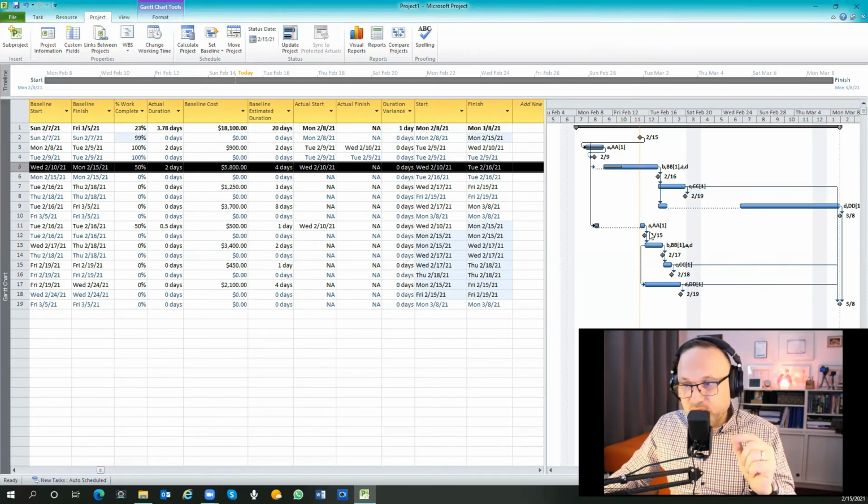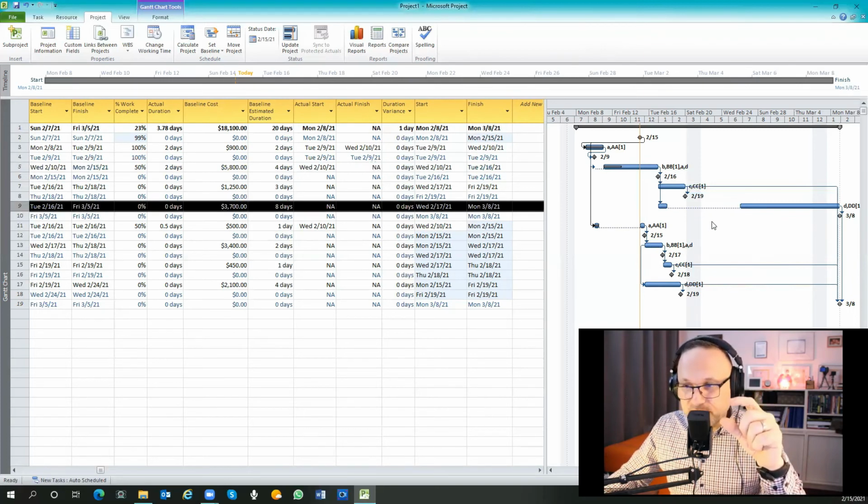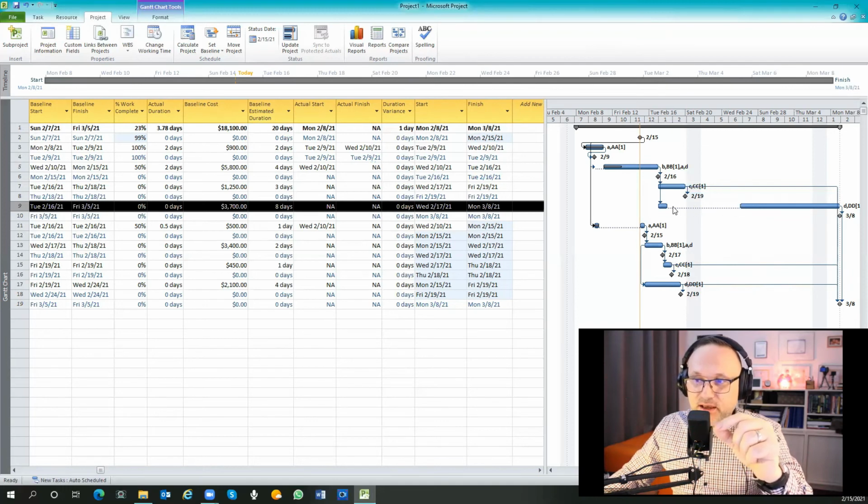There will be a delay only of that group of activities, which will be shifted a while, but there is floating time. So you can use the resources here, adding them to this activity, which is already interrupted because there are no available resources. And once you move your resources from those activities to this activity, this activity will be back here, and you will be back to your schedule.